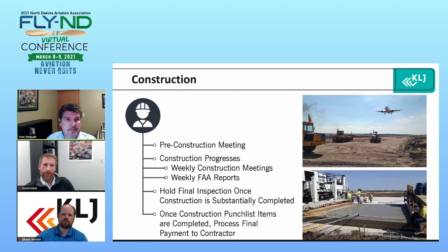So it's really a good opportunity for everybody to get on the same page so we're marching in the same direction. And then as construction progresses, it's a good idea to hold weekly progress meetings on most projects. Certainly if you have small projects, crack sealing and things, maybe it's not necessary, or maybe you're only going to have one or two anyway. But certainly for most projects, it's a really good idea to have those weekly construction meetings.